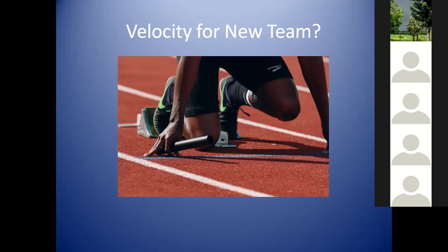What does this high level guesstimate mean? It will be prepared with the help of weeks. For every t-shirt size we will give some weeks. For example, small means 2 weeks, medium means 4 weeks. Like that we will prepare, and we will ask the team, with the current knowledge you have, tell us how much time this epic will take. You will not even go to the story level, because if you have not started anything in execution, you will only have epics. You don't even have stories, right?